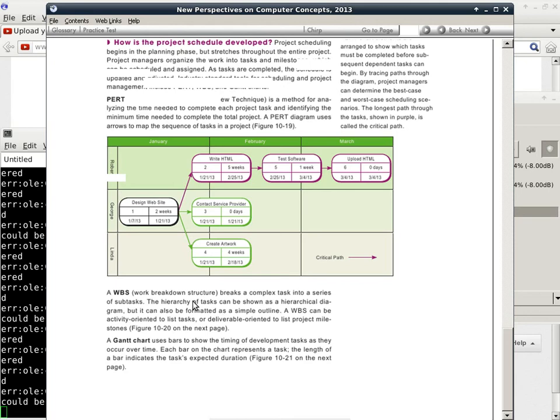That will take another half hour or an hour. Then you move on to the next one. That will take half an hour to an hour. So in a day, you can get 8 little chunks done, instead of spending all 8 hours worrying and saying, oh, I cannot possibly get this done. I cannot get started, right? Well, that's one reason. But the second reason is this will give you a better way to estimate how much time a task will take by breaking it up into smaller chunks, and then do a more accurate estimate of each smaller chunk.